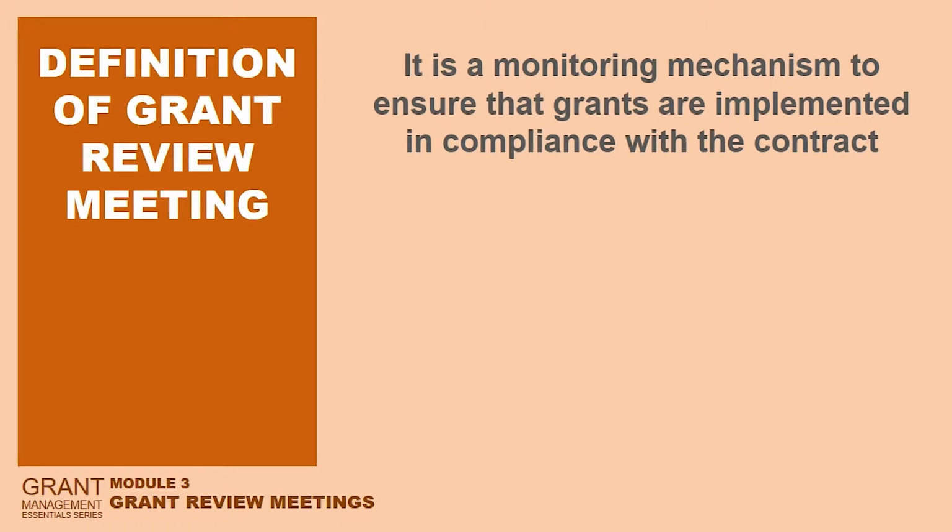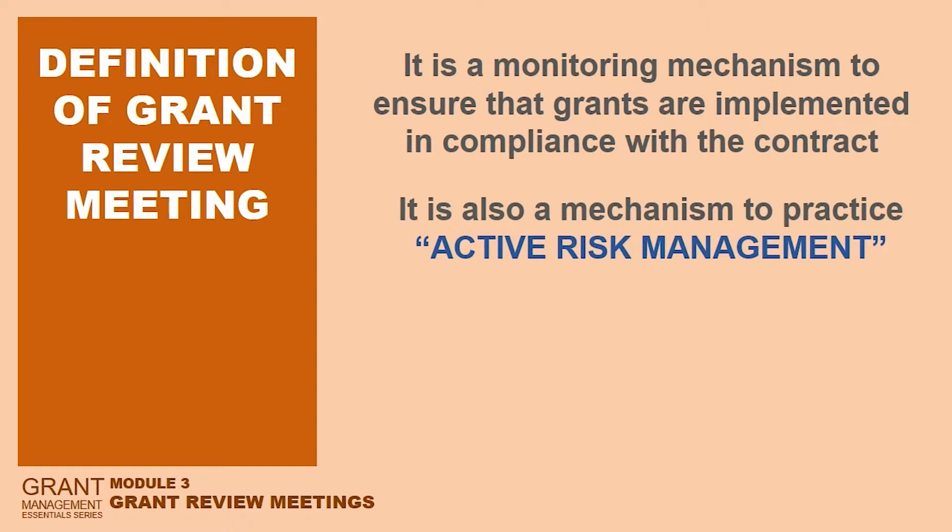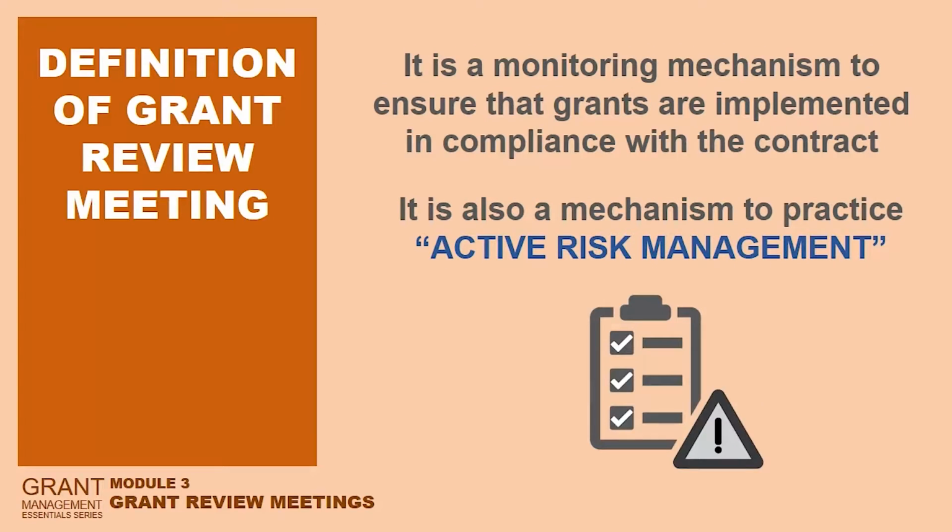Definition of grant review meeting. There is no universal definition of grant review meetings, but it is a monitoring mechanism to ensure that grants are implemented in compliance with the contract. It is also a mechanism to practice active risk management. This means reviewing grants on an ongoing regular basis and identifying what risks come up in real time and addressing those risks in real time.